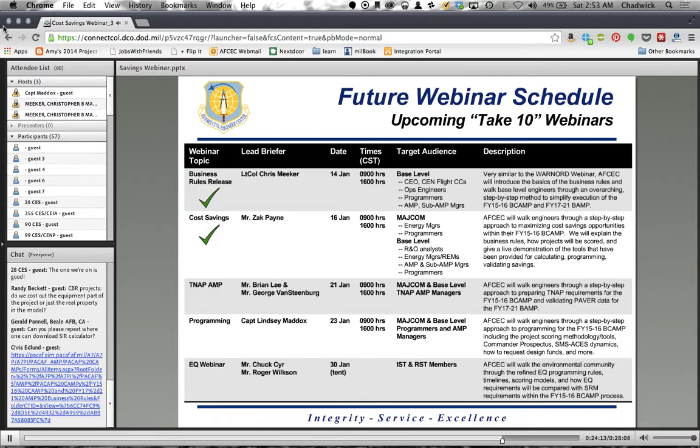The answer to that would be yes if they're being used to offset our acquisition cost. That's what we're trying to capture there, essentially offsets to our acquisition costs. The key is that the centralized program is not going to necessarily be funding the full requirement. So if we have money coming in from some other area, then it's going to offset the amount of centralized funds that we have to use, so that we can use them in other areas of our program. So hopefully I answered that one for you.